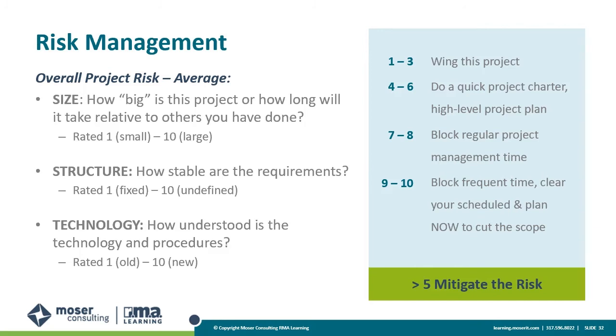So don't get stuck on the technology word. There's not much technology in cleaning up a sidewalk, so I'll call this risk 2 out of 10. Next, you average all 3 of your numbers to come out with a risk. In this case, the average is about 3.6 out of 10.